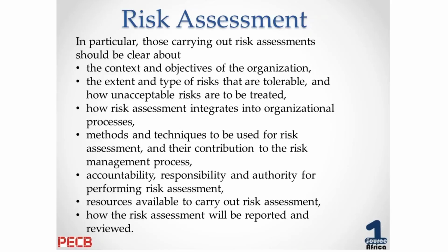It's not going to wait for you until the end of the month or end of the quarter or 6 months or end of the year to show itself that there's a different reality in your risk than what you have in your risk register. So firstly, we need to understand that risk assessment is a continuous process and not periodic. Methods and techniques to be used for risk assessment and their contribution to the risk management process.